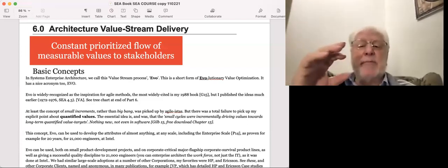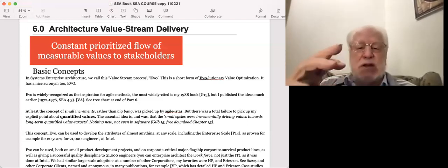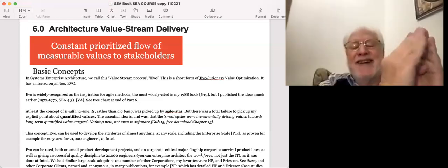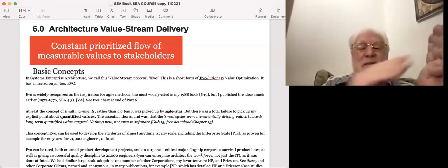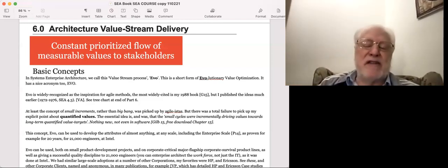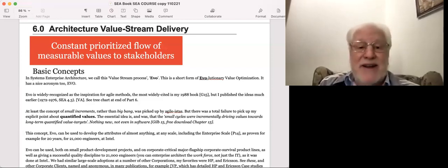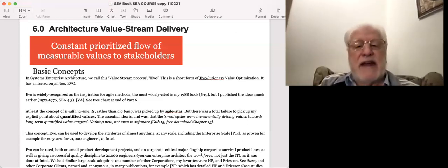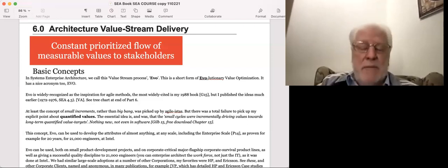Now, it turns out when you compare waterfall projects with agile projects, agile is slightly better. But slightly better means the total failure rate is like 25% instead of 30, which is not good enough. It's ridiculous. The reason Agile succeeds better is because of the shorter feedback, giving people signals at an earlier stage that something is wrong.